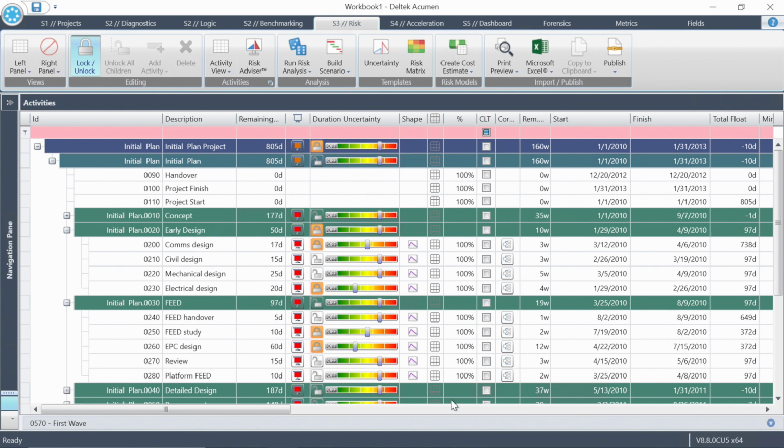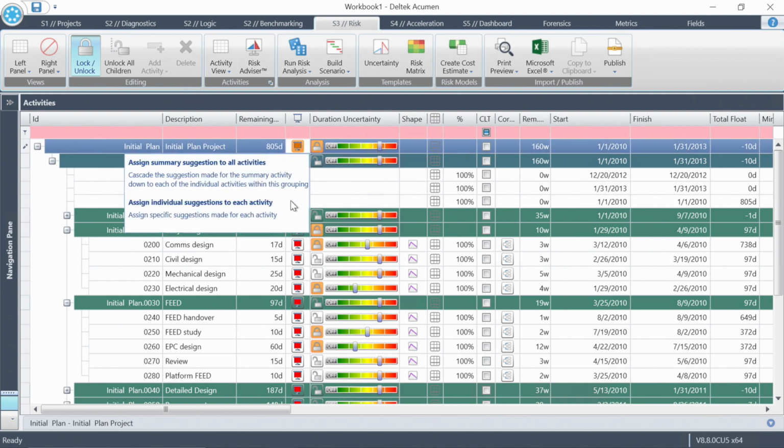And the premise here is that areas of the schedule that have negative float, missing logic, excessive use of constraints and leads and lags might not flow the same way in the forecast as they should, especially if predecessor work moves out. So I have a series of recommendations here now based on the risk advisor, and it's recommending a lot of red because there are substantial quality problems with this schedule. Probably should have spent more time doing a Fuse analysis, and there's a lesson in that to assure you have a high quality schedule.